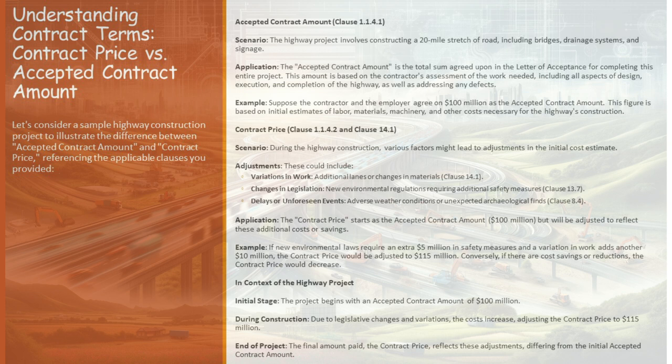Our journey is also at the mercy of delays and unforeseen events. Consider adverse weather conditions — prolonged rains lead to work stoppages. Then, an unexpected archaeological find halts progress, requiring careful excavation. Such delays not only push our timeline but also add to the costs. Additional site management, extended equipment rentals, and delayed labor payments contribute to the rising contract price. Let's add another $3 million for these delays. The contract price now stands at $118 million.